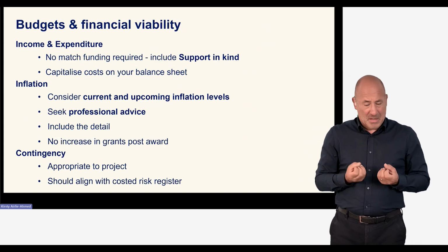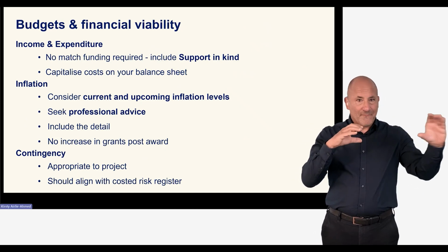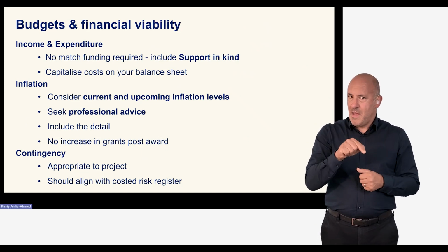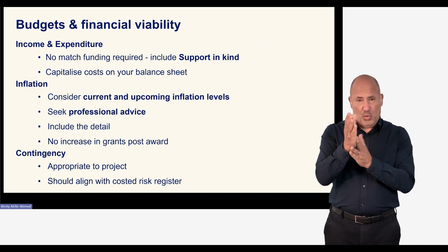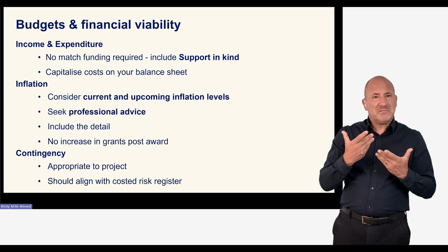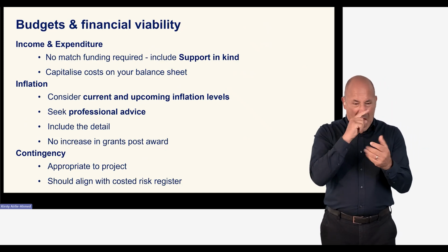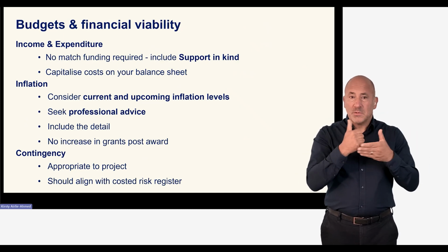Income and expenditure. No match funding is required for LIFT projects, but it can strengthen an application. Remember to include support in kind, which is any goods or services you receive during the funding period towards the project, either for free or at a reduced rate. That value can contribute towards your match funding as support in kind.